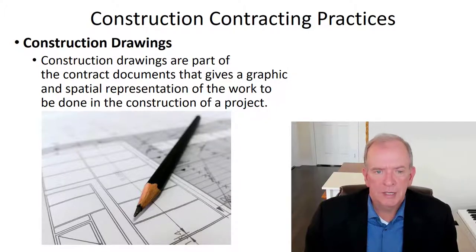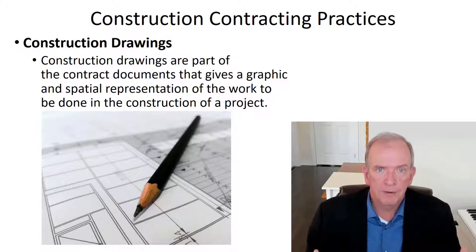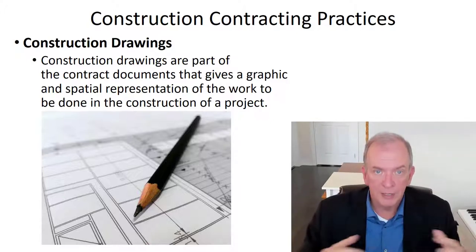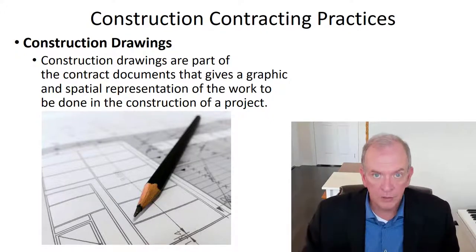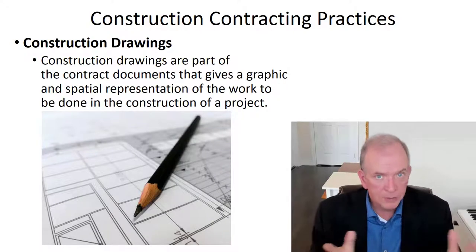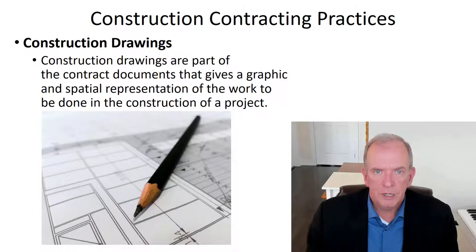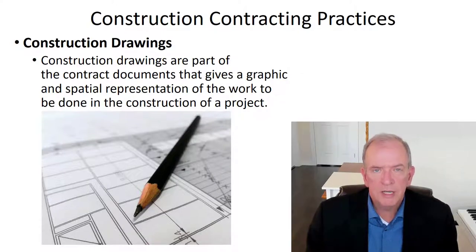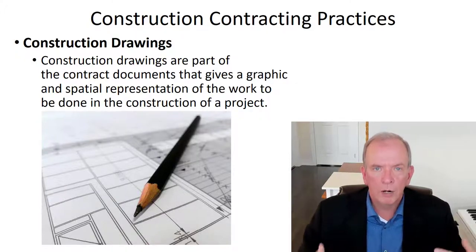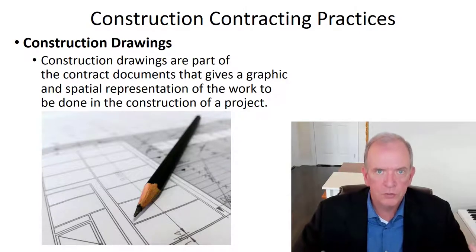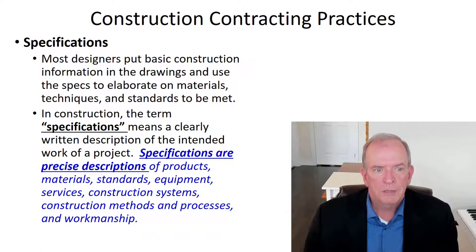The site plan gives you a good spatial understanding of the project. It's taken from the property or lot survey — the legal titled survey — so it shows the dimensions of the lot and where the building is going to be located, including setback requirements and height requirements. All of this has to coordinate with the permit office and regulatory authorities so you can get the proper approvals to construct the building.